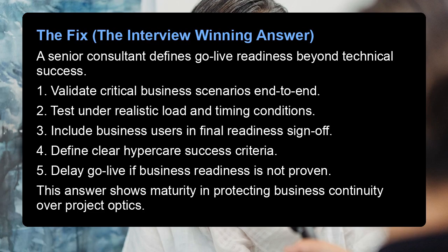The fix, the interview-winning answer. A senior consultant defines go-live readiness beyond technical success. 1. Validate critical business scenarios end-to-end. 2. Test under realistic load and timing conditions. 3. Include business users in final readiness sign-off. 4. Define clear hypercare success criteria. 5. Delay go-live if business readiness is not proven. This answer shows maturity in protecting business continuity over project optics.